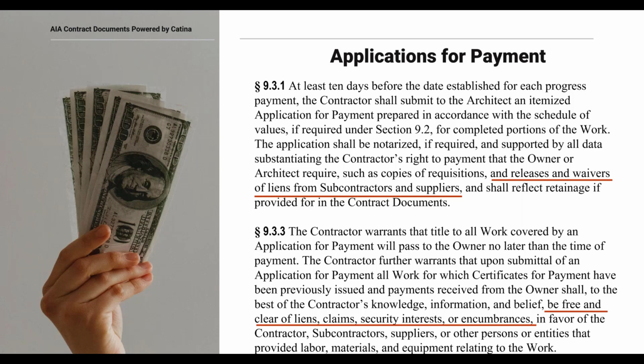Sara, I know you're going to talk about some of our lien waiver documents at the end of the program, but just to kind of stitch this together in real time here, can you give us the document numbers for what we have for like progress payments in terms of lien waivers? Yeah, and so as Mike said, we'll definitely get into the details about this later in the presentation, but we have lien waiver and release documents for progress payments, and those document numbers are the G901 and G902.